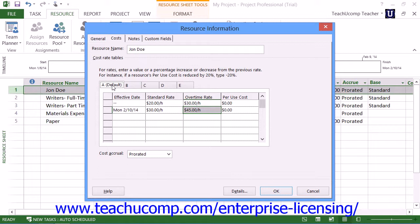Also note that for costing data, you can indicate when you want the cost to be incurred by using the Cost Accrual dropdown. This will tell Microsoft Project when to report the costs as being incurred for this resource. The default value is prorated, meaning the cost will be shown as the work is accomplished.